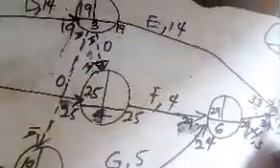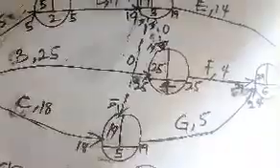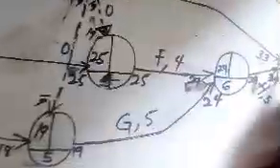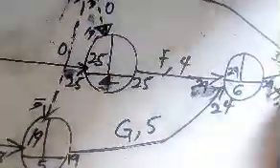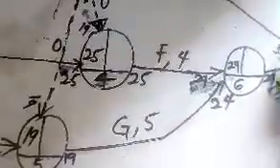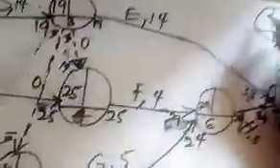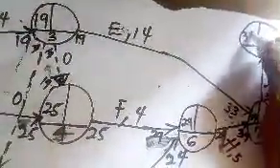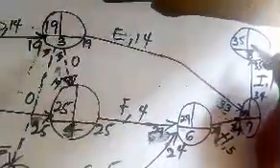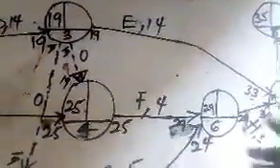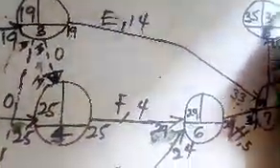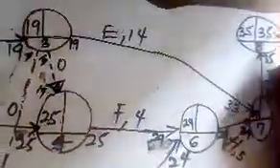So you can see how I completed the node as a whole. Very cheap, very fast. So 34 plus 1, that 34 will come out here. 34 plus 1, that is 35. So 35 will enter. Then 35. Getting to the last point, to the last activity, last event, rather, last node, you go in the same 35. Yeah, that law is applicable.